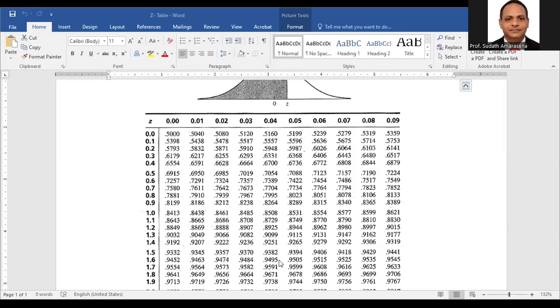But if you write down the answer as 94%, that's wrong. Because after you get this figure 0.9495, you should think that the real value is a minus value. Therefore, if you say the probability is 0.94, that's wrong, because how can we complete the project within 20 days? According to the expected completion time, we require 23 days. The question asks for the probability within 20 days. Therefore, the probability is very low, right? If you think practically.